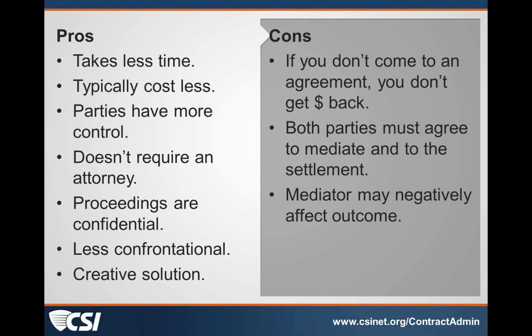I will also add that there are some jurisdictions that will require you to mediate prior to proceeding with litigation. The courts in this country typically strongly favor alternative dispute resolution. I think part of the reason for that is because there's so much litigation out there that they get bogged down with disputes, and some of the disputes are ones that are minor in nature, that they want to encourage parties to work out their disputes before seeking the court's help in doing that.